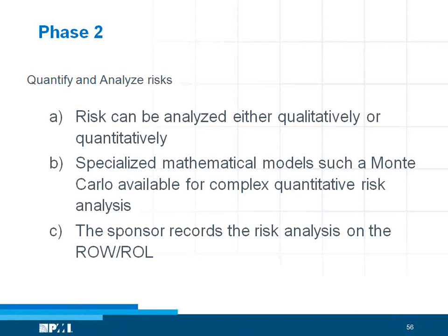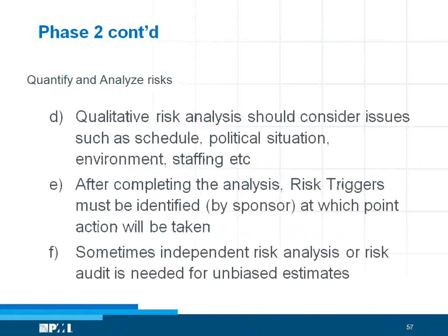Just to go back to what we started off with, when you do a risk breakdown structure, if you remember, you have all those individual items. You have identified the risks that can possibly happen to individual line items, and then you have mitigated them or taken care of them. After doing all of that, ultimately there will still be a residual risk. Now we need to find that residual risk, and that's what we are doing in Monte Carlo simulation. Individually we have mitigated. Finally, for the whole project, we need to find out what is the residual risk that can happen.